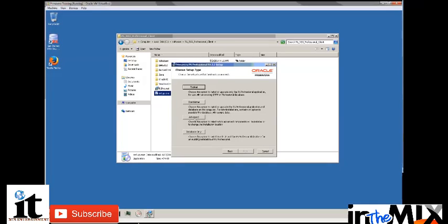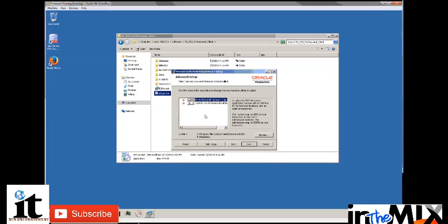I'm going to go with an advanced install because I'm using a 64-bit version of Windows and I want to install it in a location without the x86 brackets. This path is known to cause certain issues when connecting to the database if the brackets are included.